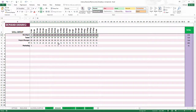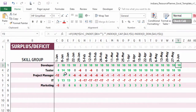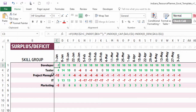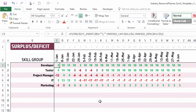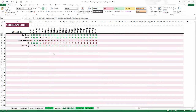The Surplus/Deficit sheet tells you whether you have surplus or deficit capacity. For example, the developer resource consistently shows surplus capacity — you have more than you need. The tester varies, sometimes matching demand and sometimes exceeding it. IT, on the other hand, shows a deficit in capacity most of the time. In this way you can easily identify where you are lacking capacity and decide to add a resource or increase available time to meet demand.